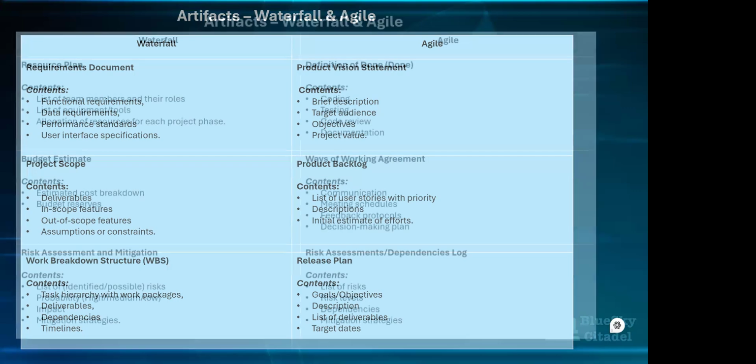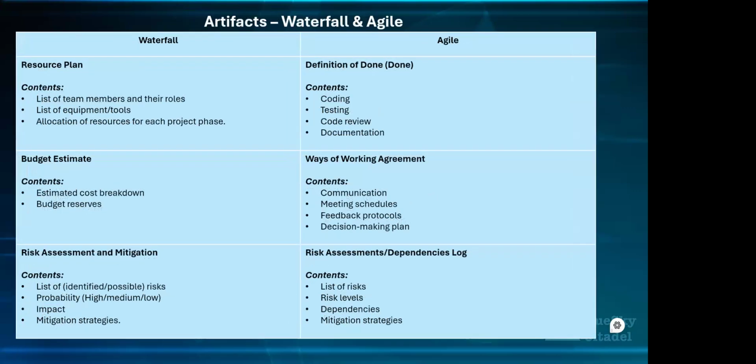After that, another artifact that needs to be in place at your planning phase is your resource plan. Most times people join the resource plan and the budget together, because when you're talking about the resource plan, you also want to put the budget in place to say, this is the estimated budget we have for this person. The purpose is to detail out the resources that are needed. It could be labor, tools, or equipment. It could be team members or software equipment that are required for that project to be actualized, at each stage or for each task.